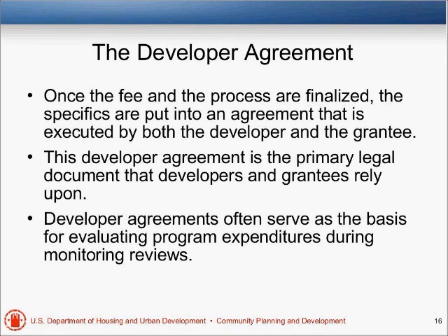A number of monitoring findings that we see are ones where people don't follow their own rules. So it's important to make sure a developer agreement is thorough, has what the expectations are, has when the fee is earned, has how change orders are handled, and when the project is done, when it's completed.